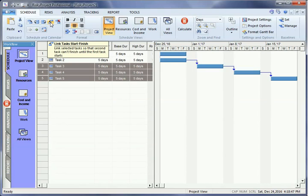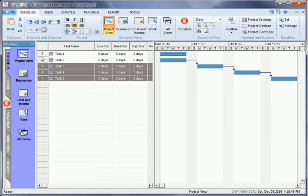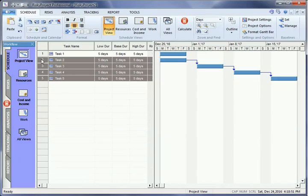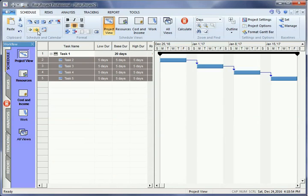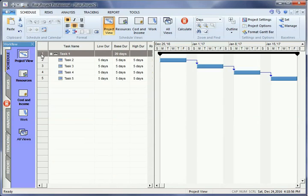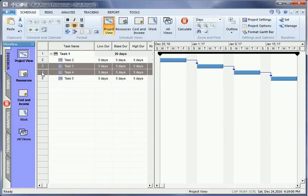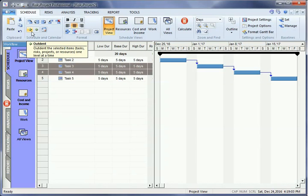To create a summary task, select Tasks 2 to 4. Then click the Indent button. Task 1 will now be a summary task. You can also use the Outdent button to move activities up a level.